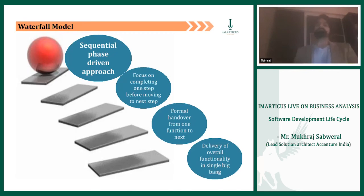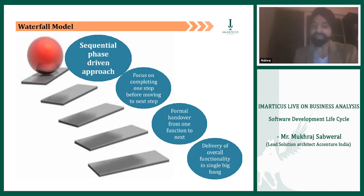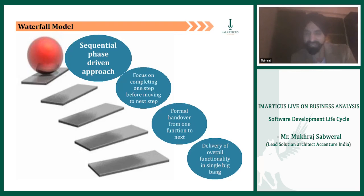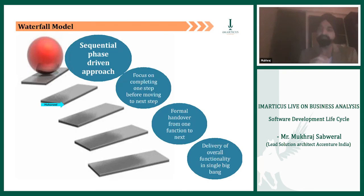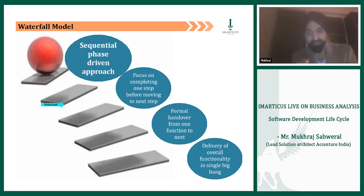Rather than standing at the gate until phase one is completely done, we enter with something to hand over to the next person. Designers, testers, and configurators are not sitting idle — the first set of requirements came in, they immediately took them and started developing designs and configuring it. A slow and steady channel was opened by Rajesh: a few requirements were thrown out, the project teams picked up and started doing it. That's an agile way of development — agile, as the dictionary says, means fast.